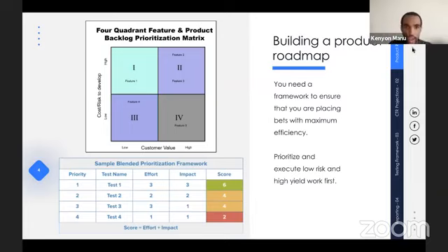And then another thing that I'll do after we do that, or it can even be before, it doesn't really matter which order they come, but make sure you have a spreadsheet in front of you or in front of the group, and you're able to assign scores. And same thing goes for this that I said about the chart, about that relative value and having these things next to each other. You can actually estimate, okay, effort is a 3. Do we all agree on that? Yes. Impact's a 3. Do we all agree on that? Yes. And go through that. And again, gauging that relative impact and effort is really helpful when you're going through this exercise.